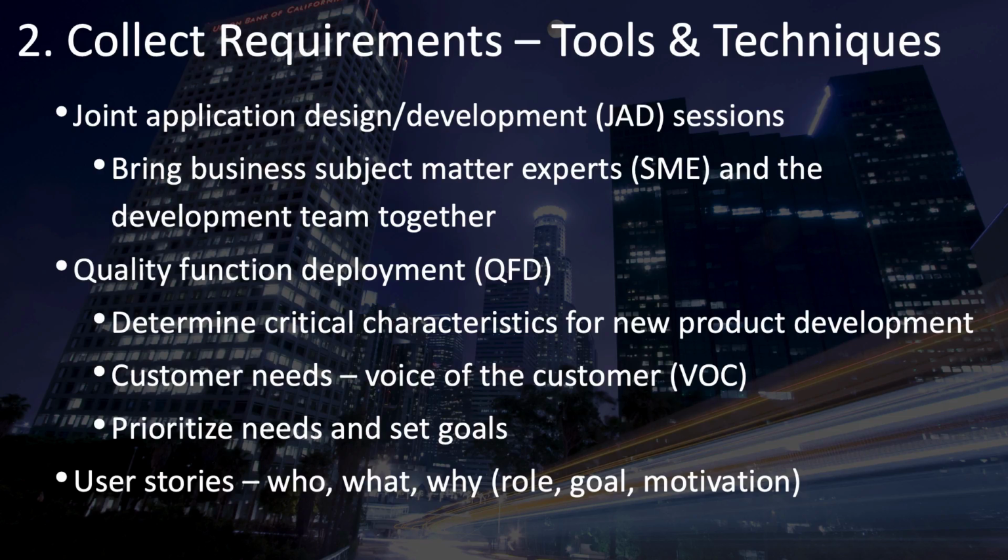Let's suppose instead you still want a timestamp, but who wants it and why? Suppose the reason you want it is so that you can take this information into a court of law and use it to guarantee and prove that these changes or notes were made on these days at these times. And what if the requirement is also to guarantee that the content of these notes and changes has not been altered since it was timestamped?